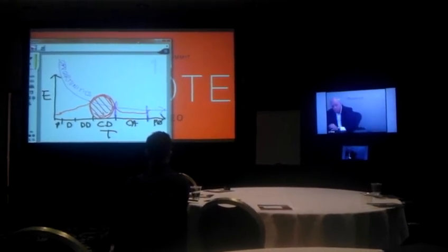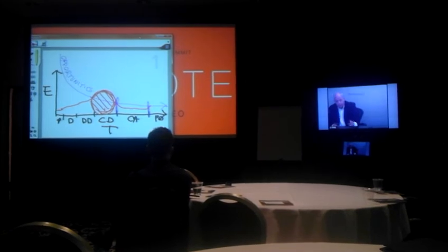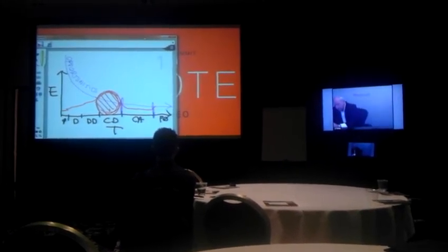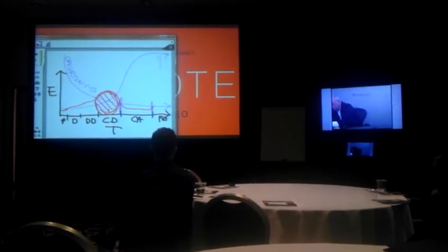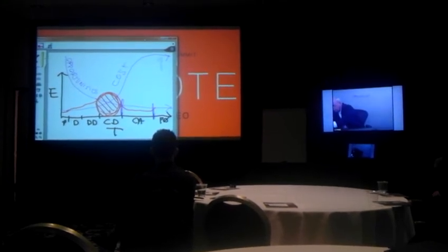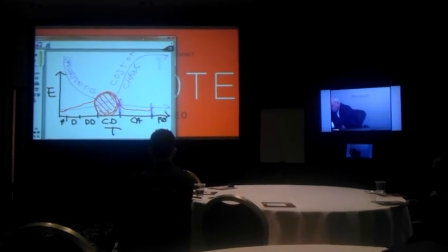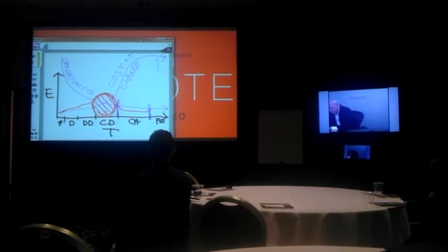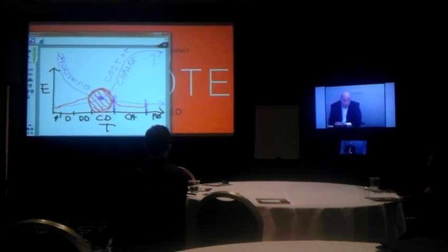At the same time, the cost of change, which is another real reason why you're all in that room together, starts out very low cost to change something early. And as more and more of the building is documented, that cost of change has occurred something like this. So this is the cost of change. Where these two meet, I call that the point of no return.